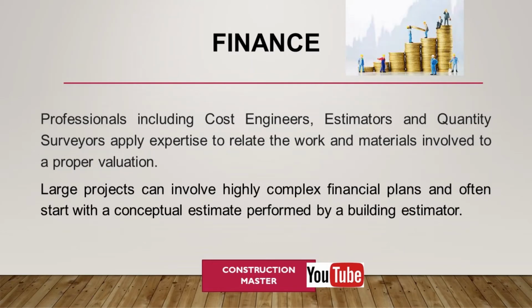Finance. Professionals including cost engineers, estimators, and quantity surveyors apply expertise to relate the work and materials involved to a proper valuation. Financial planning ensures adequate safeguards and contingency plans are in place before the project is started and ensures that the plan is properly executed over the life of the project. Construction projects can suffer from preventable financial problems. Underbids happen when builders ask for too little money to complete the project. Cash flow problems exist when the present amount of funding cannot cover the current costs for labor and materials.